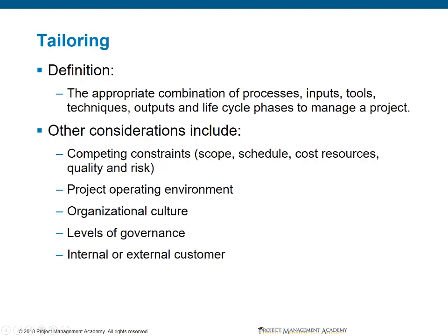to spend. If they tell us that the schedule, if we have a very hard, firm, externally imposed deadline, we must deliver by February 1st, no later than. In this type of situation, we may need a lot more money, or we may need the ability to de-scope as required. If money is a primary concern, if we cannot spend more than $2.5 million, we may need to move the schedule around, or we may also have the ability to de-scope some requirements.